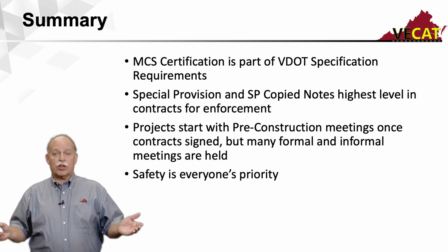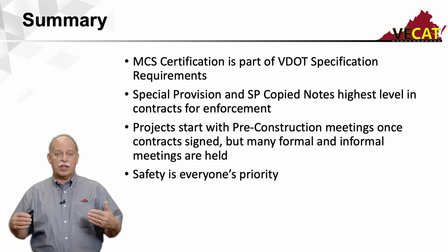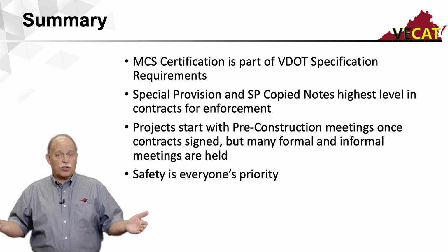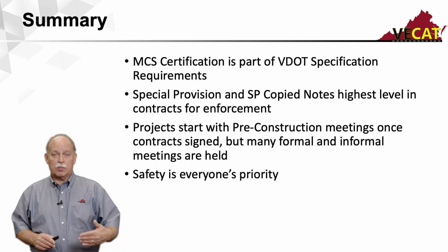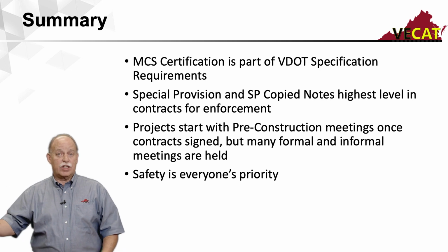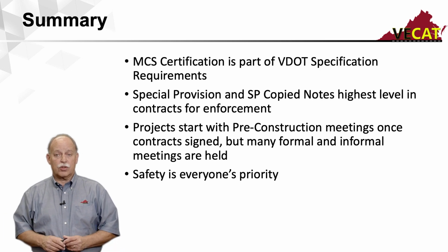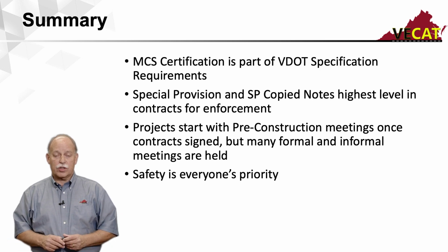Projects start with pre-construction conferences. Every single project starts with a pre-construction conference once that contract's signed. But then there's also formal and informal meetings that I brought up that occur throughout the life of the project as well. You may have a monthly progress meeting that occurs as a formal meeting, and then you may have just daily meetings that are informal meetings on a construction project. And lastly, safety is everyone's priority, so we need to ensure that everybody goes home at the end of the day.